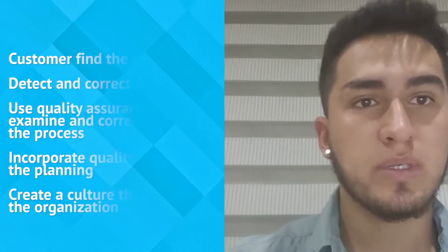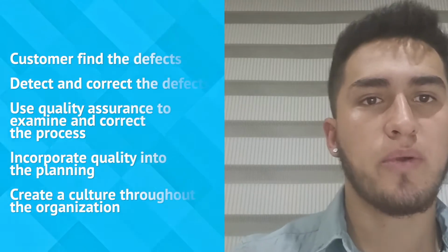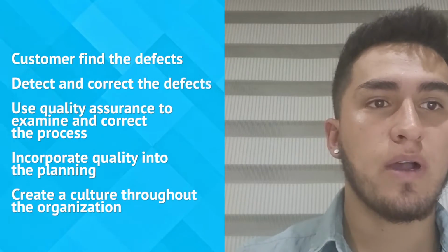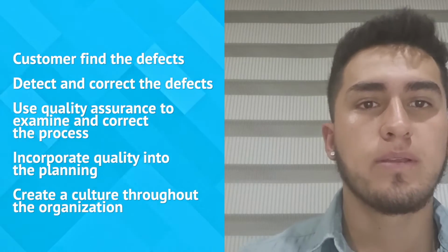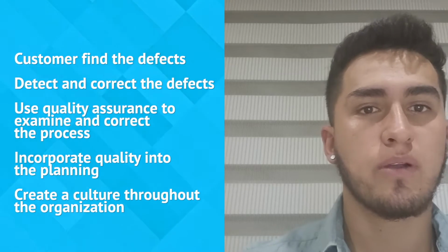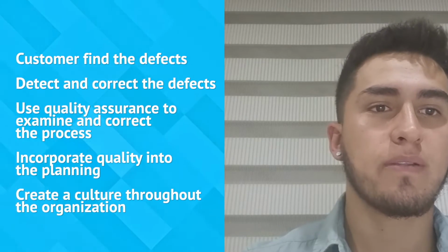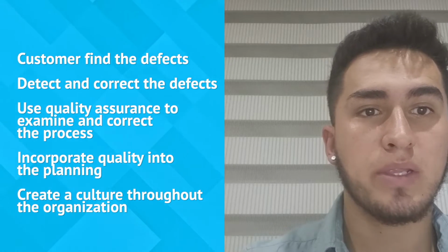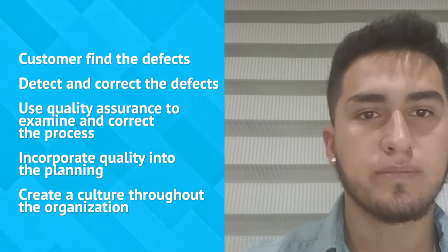Usually the most expensive approach is having the customer find the defects. This approach can lead to warranty issues, recalls, lost reputation, and rework costs. Next, detect and correct the defects before the deliverables are sent to the customer, as part of the quality control process. The control quality process has related costs, which are mainly appraisal cost and internal failure cost.